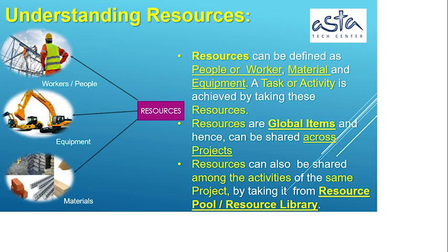Understanding resources. Resources can be defined as people or worker, material, and equipment. A task or activity is achieved by taking these resources. Resources are global items, and hence, can be shared across projects. Resources can also be shared among the activities of the same project by taking it from resource pool or resource library.